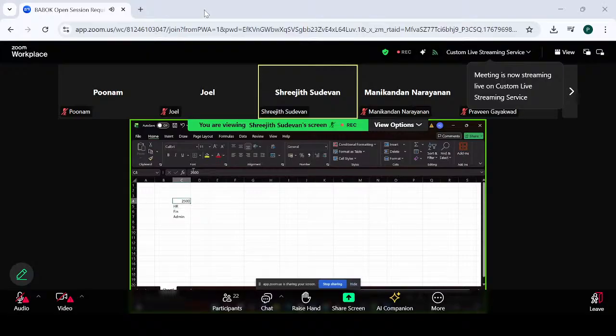So if you just keep all 2500 requirements together, do you think that will be a good approach to maintain the requirements? Definitely there are so many requirements, it will lead to confusion. So instead what we'll do is create viewpoints. For example, we'll create an HR viewpoint, and all the requirements related to HR, say there are 500 requirements, 1 to 500. We'll create a viewpoint, and we'll create a view for those 1 to 500 requirements.